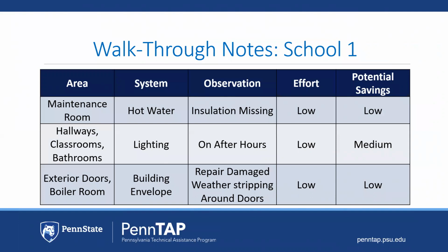So if you consider that, low is 5% savings of a system, or medium, which is 5 to 10% savings, and then high is a range between 10 to 30% savings for altering a system. You should have a list of several low, couple medium, and maybe 1 or 2 high. And you want to do this for every building.